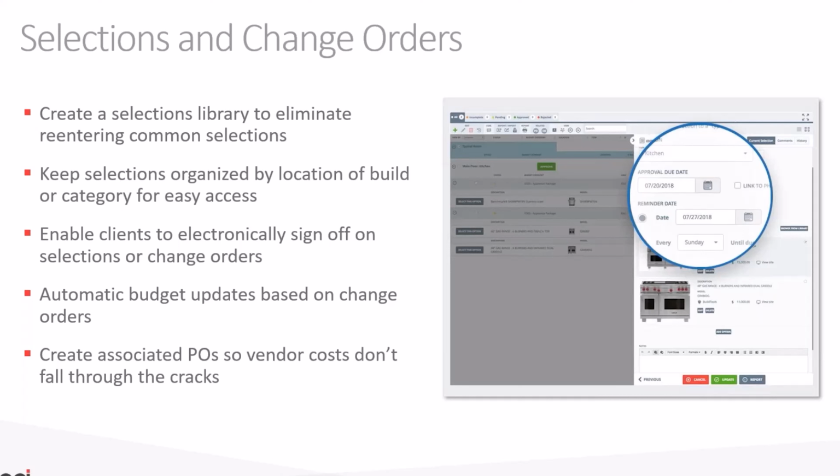The capability of the system is to be able to define exactly what that change is and then have the buyer sign off on it electronically to approve it and say, yes, that is in fact what I intended in this change, and I approve to pay this much money for the change. And then inside of BuildTools, that change is then routed over to the budget. So now the budget is updated, and we have an accurate budget as a construction company.